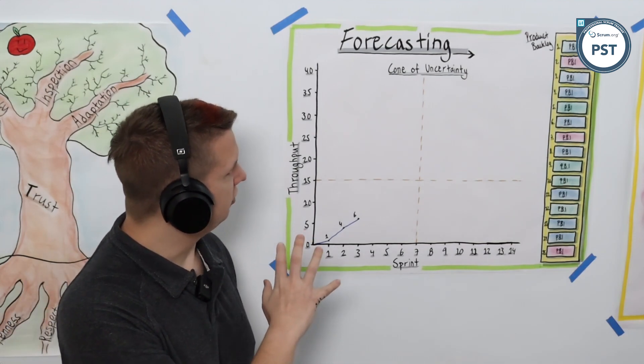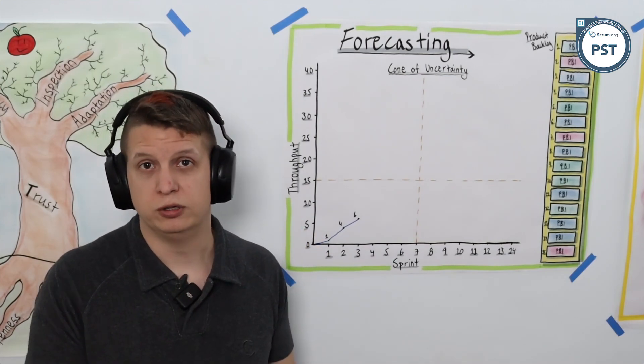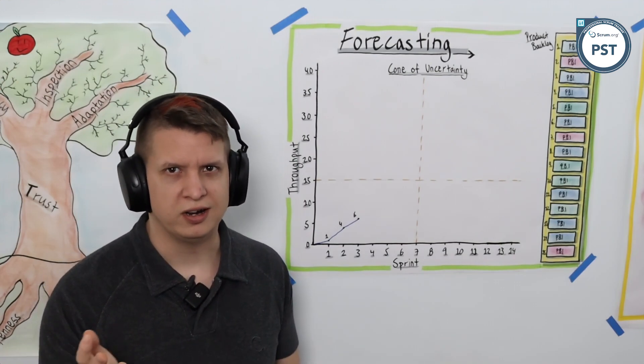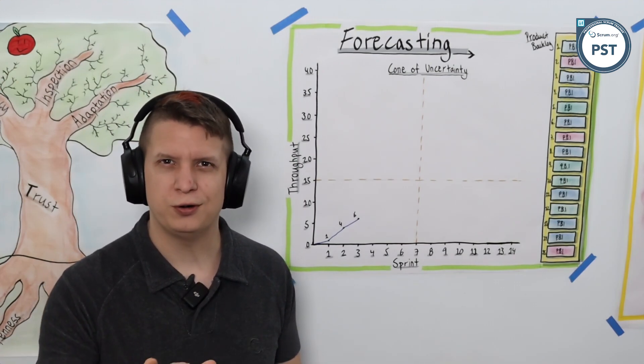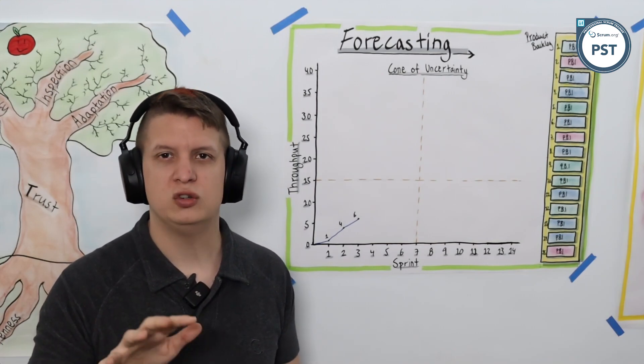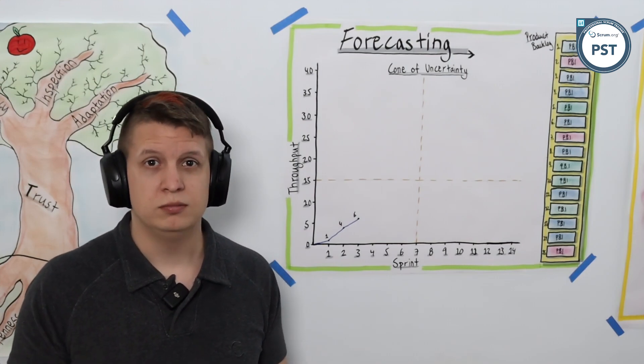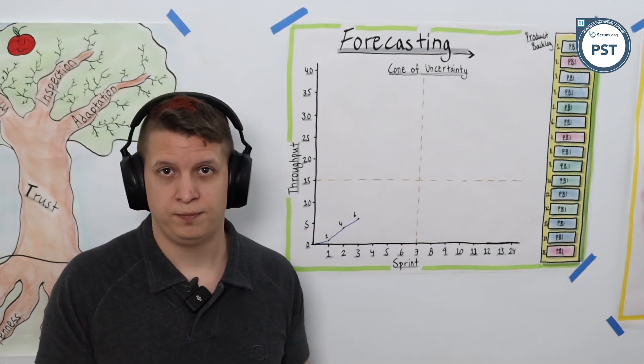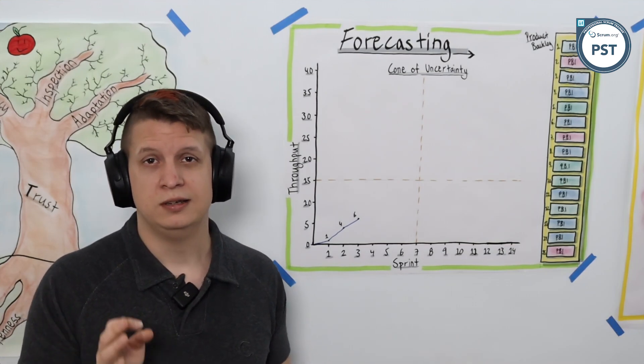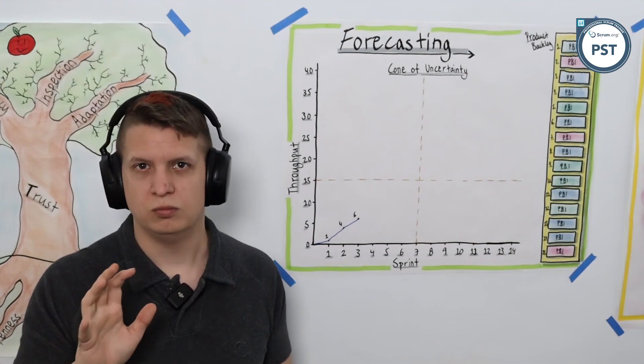For forecasting and the cone of uncertainty, my recommendation is to use throughput. You may have heard of or used velocity before, which is fine. Throughput is the same idea of how much work can get done in a period of time. Because we're talking about scrum, the period of time would be a sprint. So how many product backlog items can get done in a sprint - that number is your throughput.